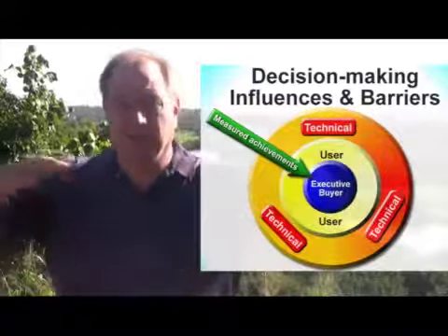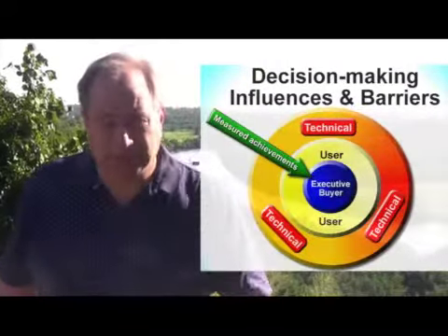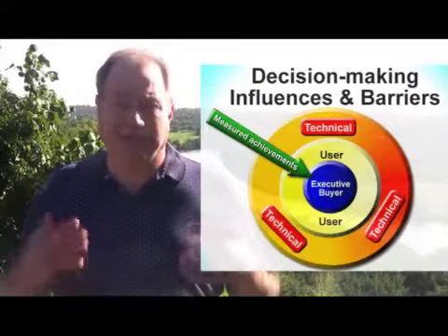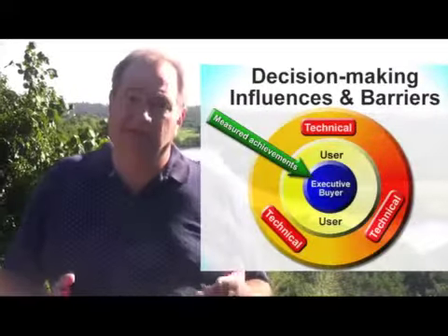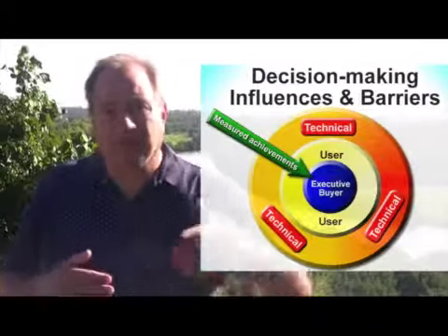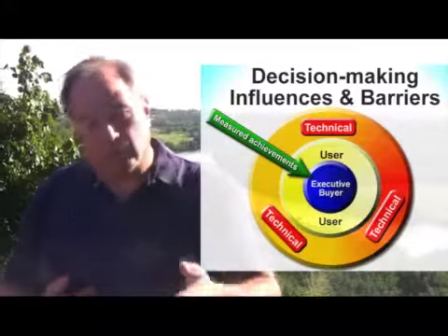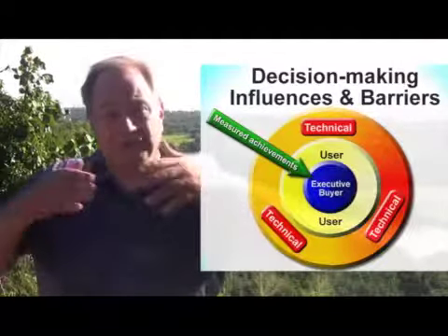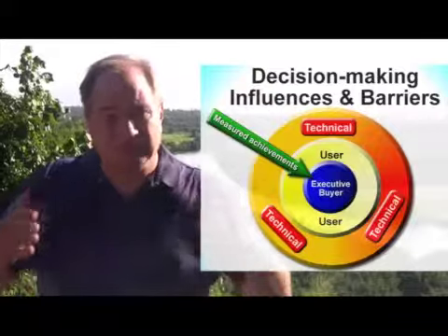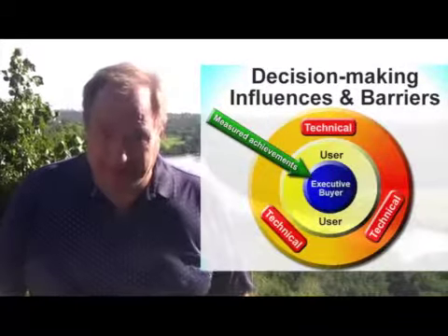And then there's another group of decision makers who are user decision makers. They're the people who are actually going to implement what the project delivers in their departments, in their customer service department, in their operating department, in their inventory control department. So understanding their performance pressures is also important, but first, of course, we have to identify them.